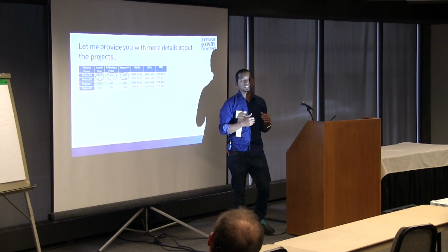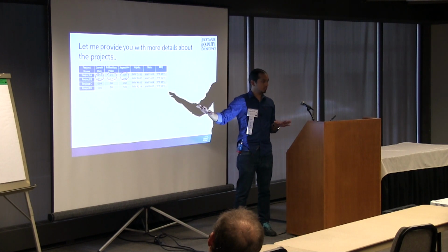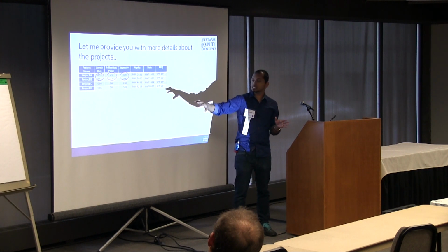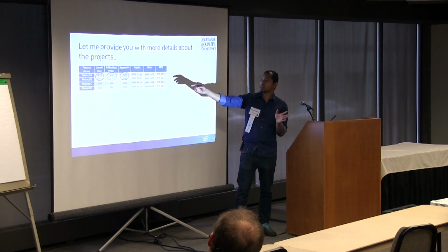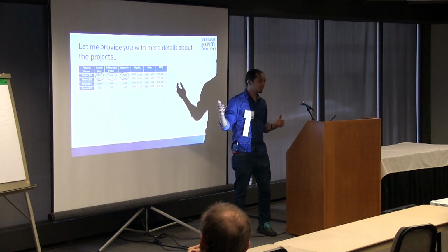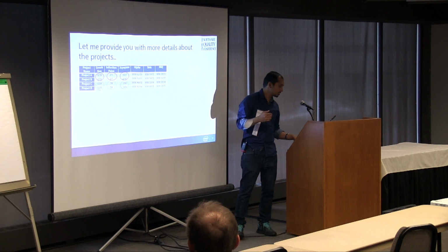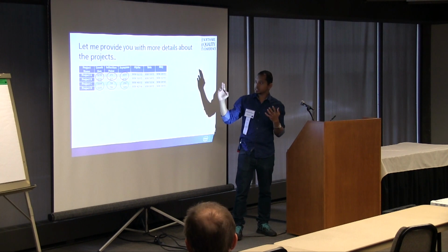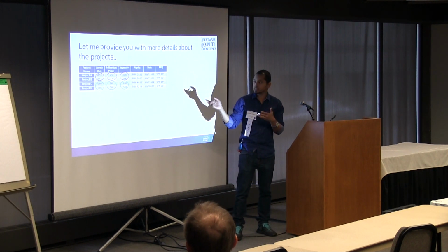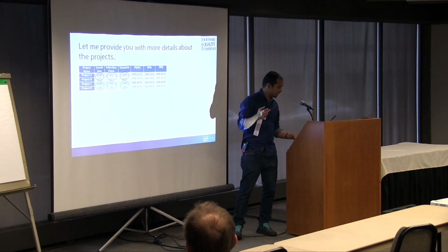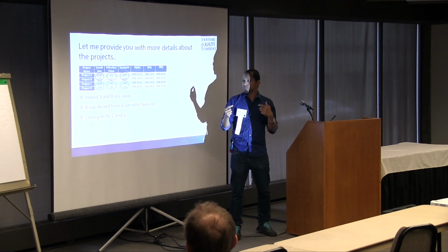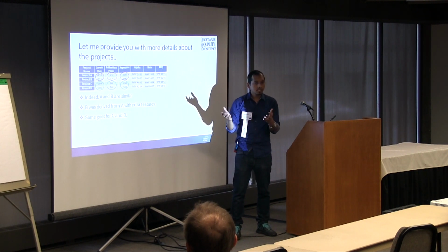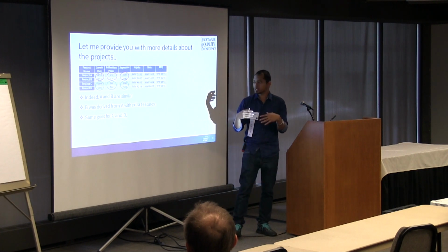Say if I were to say, just ignore project C and project D for an instance, and just look at A and B. Now you see 0.18 and 0.15, just ignore 0.04 for a second, and 78 and all that. You see 3,000 and 4,000 defects. These make more sense to club A and B together. Similarly, ignore A and B and just look at C and D. You see 0.04, 0.05, 78, 260, and 300. This makes more sense. Indeed, this is what happened. A and B are similar. B was derived from A with just an incremental number of features. Same goes for C and D. And C and D were nowhere related to A and B, and vice versa.